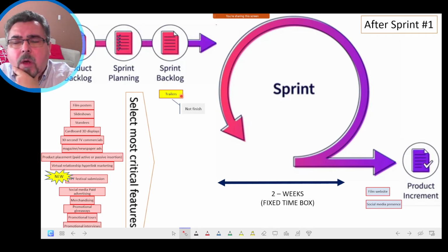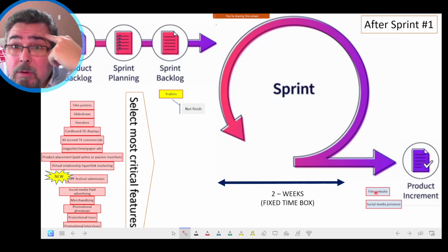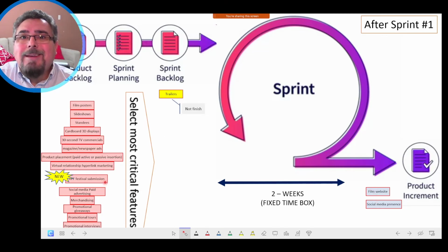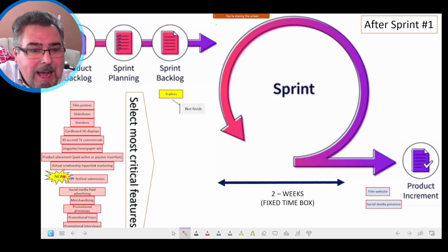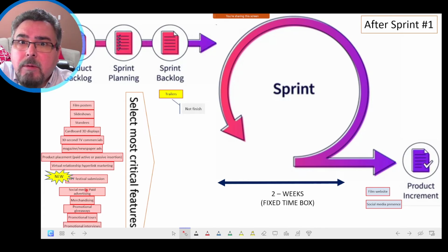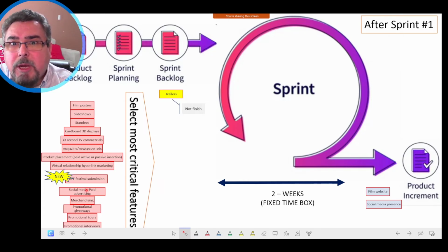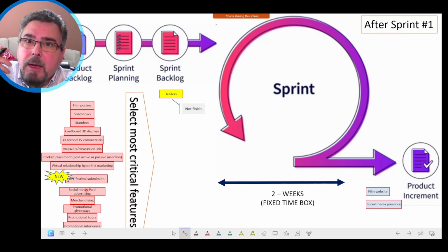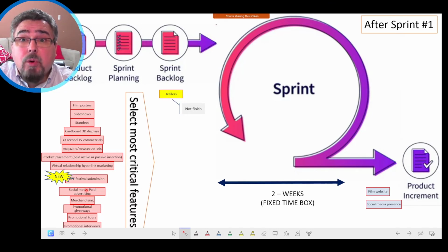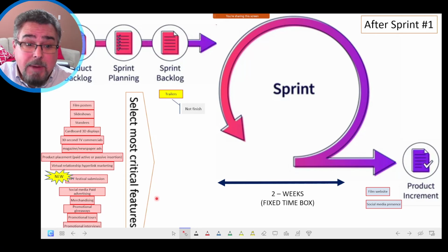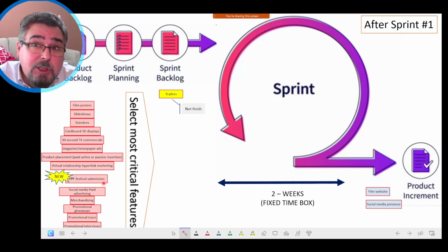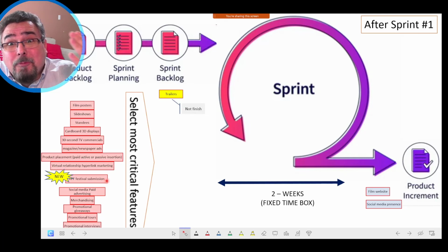And the client comes back and says, oh, okay, I like that, but I have another thing. There is an International Film Festival in Toronto, Canada, and I want to participate in that festival. He can add a new feature, a new requirement now. So can you create a package so I can submit my registration to show the film in the Toronto International Film Festival? And here is a major concept in that adaptive project management methodology, because after 2 weeks, you can come back, check with the customer, and maybe change a little bit the scope. And from now, you start working on the second sprint.